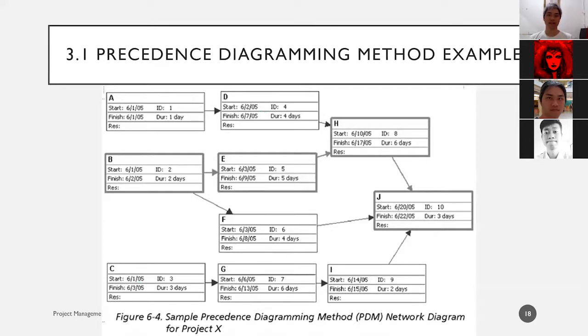And this is the same representation, only it's using rows inside the tables to determine the earliest start and earliest finish. So in this one, the conclusion is the last activity, the J, can finish in the 22nd day of June, and the project starts on the 1st June, which means about 22 days.